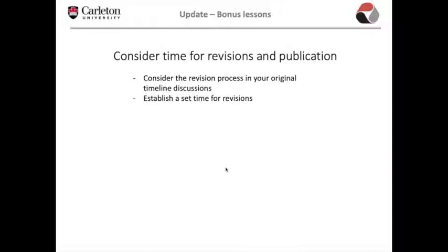We recommend establishing an understanding from the beginning that there will be a set time for revisions and that this will need to be adhered to in order to meet deadlines. This could be, for example, one round through the authors and then it is up to you to reconcile as authors, or give authors a maximum of 1 month to provide comments or feedback, depending on your situation.